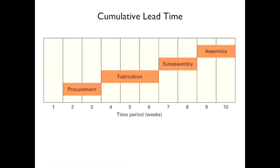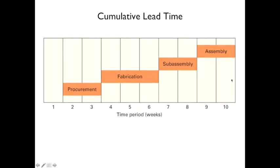Let's look at cumulative lead time. Say it takes 10 weeks to do something. The first week you place an order — there's a two-week lead time from when you place the order until it actually arrives. Then you need three weeks for fabrication, then sub-assembly, then assembly. That gives you a cumulative lead time of 10 weeks.